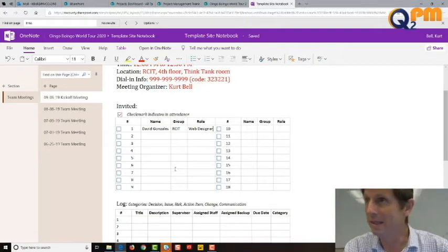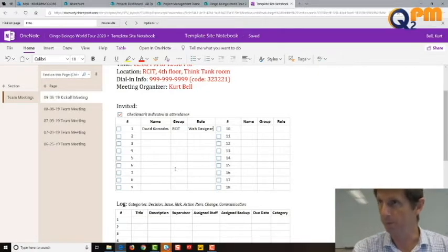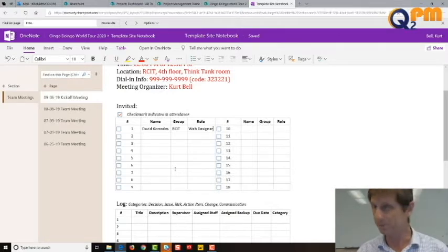Nowhere will you really see any names until we get to the plan. Because the plan is where in the proposal we said we want to have this project, and we want to choose this particular option. Now we go out and we locate all the names. We go to the heads of each of the units that we're going to be involved with and say, give us a staff member and give us his or her backup. So we always want to have a name and a backup. But in the charter itself, in the project plan, it'll just be the names of the assignees, right? So it'll grow from there.